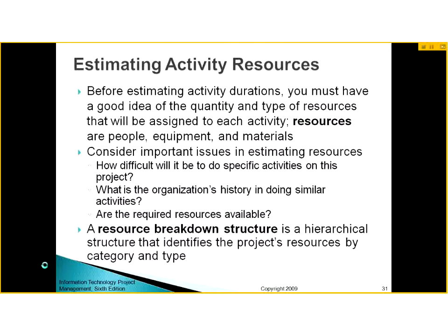Now, you have made a diagram, either an activity arrow diagram or a precedence network diagram, to show the dependencies of activities, to show the sequence of activities. Okay, now you have to estimate activity resources. Before estimating activity durations, you have to estimate the quantity and type of resources that will be required.